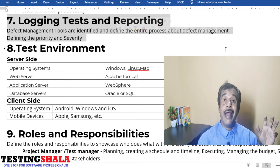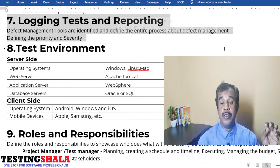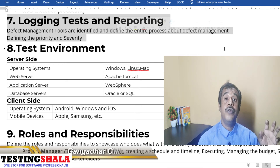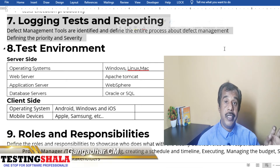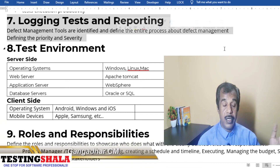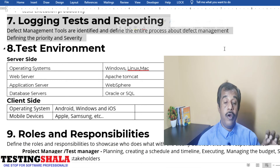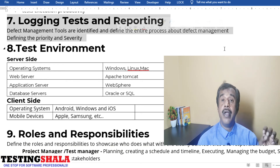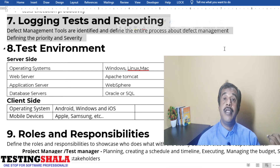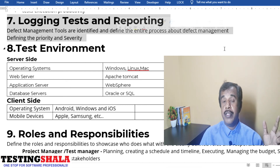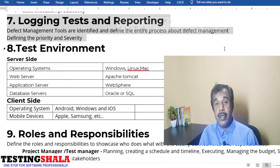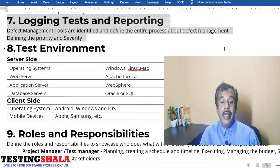Section seven covers logging, tracking, and reporting. To log defects, you need the right test management or defect management tool. As a test manager or test lead, you should define the defect management process and document it here. You should also define what priority one, two, three, four means and what severity one, two, three, four means — all those definitions belong in this section.